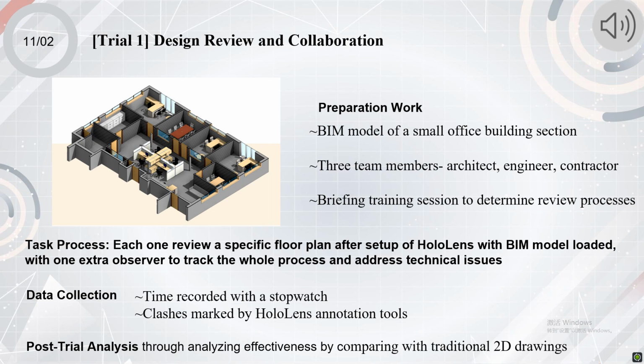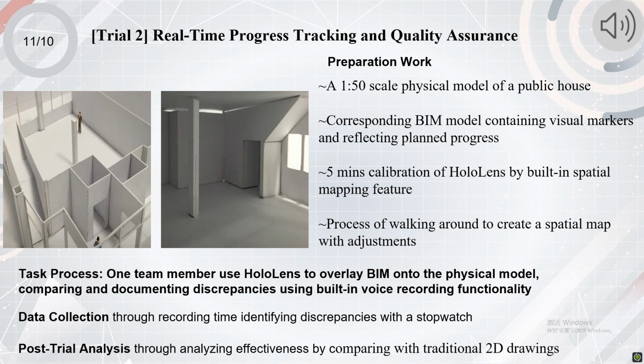This experiment simulated a real-world construction site using a constructed physical model and the corresponding BIM model. Team members used HoloLens to overlay the BIM onto the physical model. Comparing the physical progress to the design, the goal was to measure improvements in discrepancy detection. Processes were similar to the last experiment: preparation work, task process, data collection, and post-trial analysis, and the results show a 10% increase in the